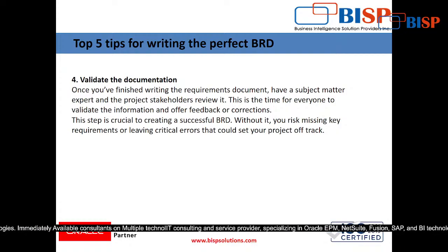Because in many projects it was seen that the higher authorities said okay, the BRD is okay and everything is okay, and at the end, when the end users were involved for the training, they raised the objections that why is this thing done in this way, because we are habitual with that proper procedure, and this procedure is obsolete, not used nowadays. So that is why all the stakeholders should validate that document. Yeah, okay, this is what we are requiring, right? This step is crucial to creating a successful BRD. Without it, you risk missing key requirements and leaving critical errors.